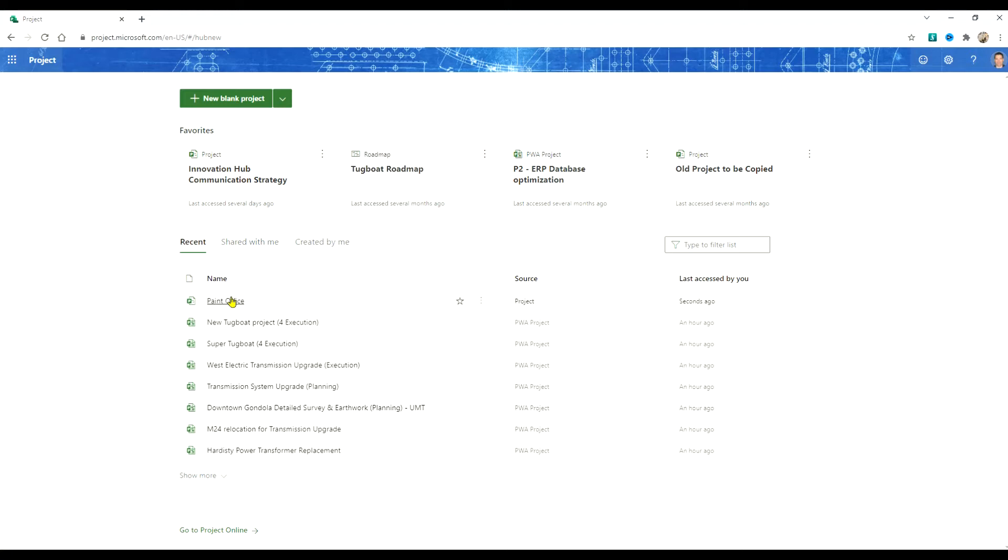To create a copy of your schedule or the new schedule from the template you're going to select more options and copy project.